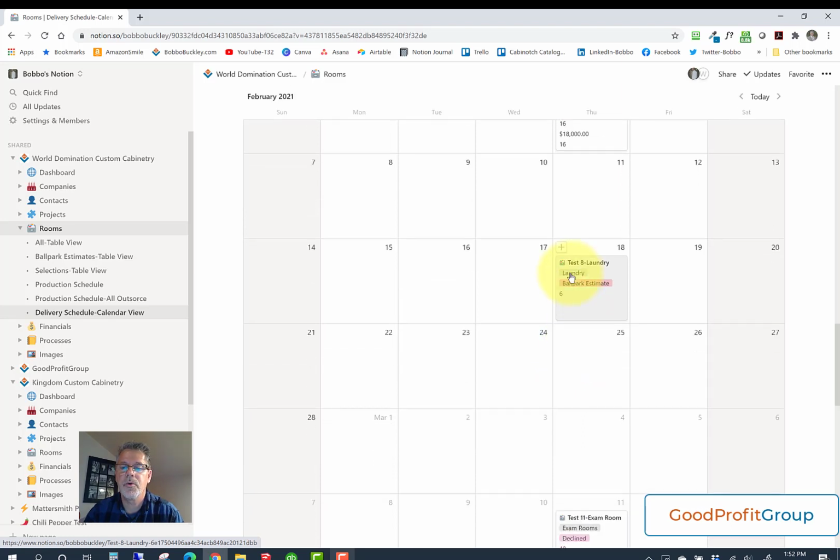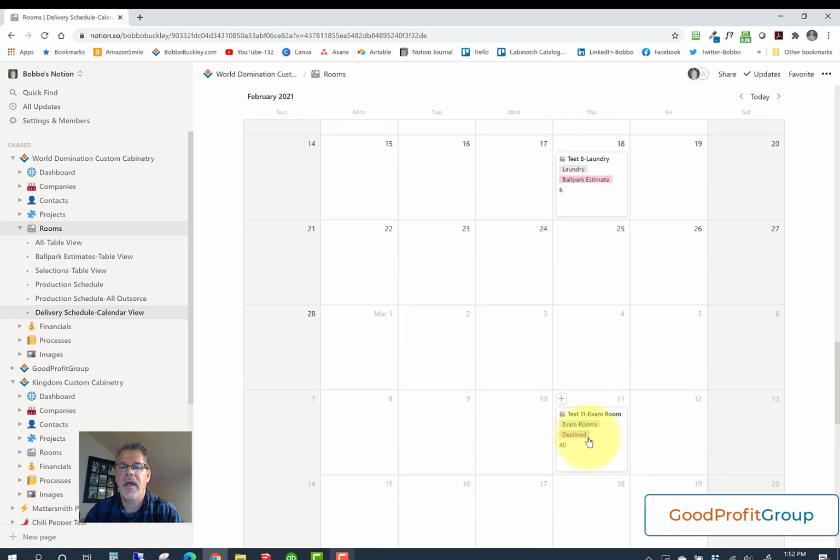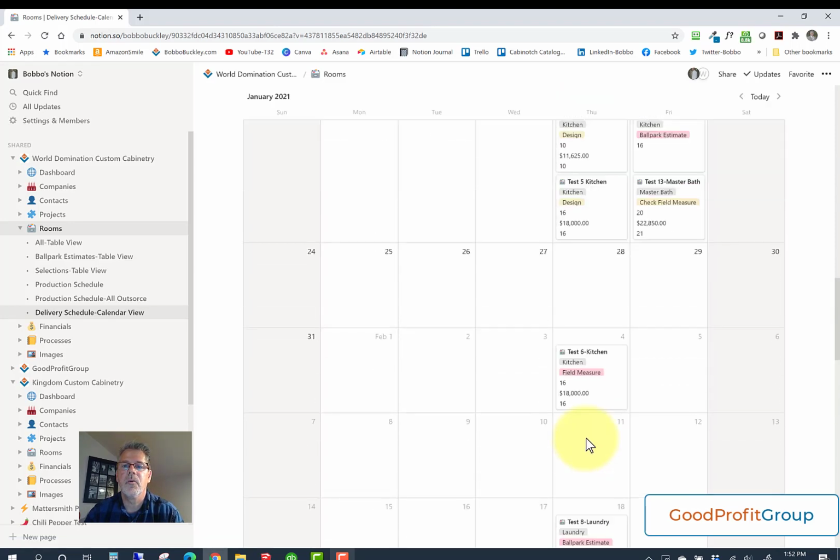So if it's a week, partial week, or half, we know that if the cabinet quantity is around 20, we know that's a full week for the company that wants $20,000 in sales. So 6 is definitely not a week. We're looking for more sales than that. 40 is 2 weeks. So that really gives you a really good idea where you can plug jobs in.